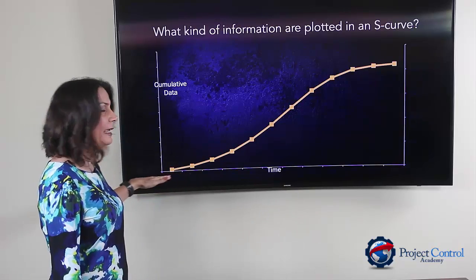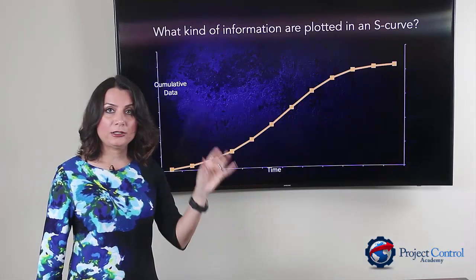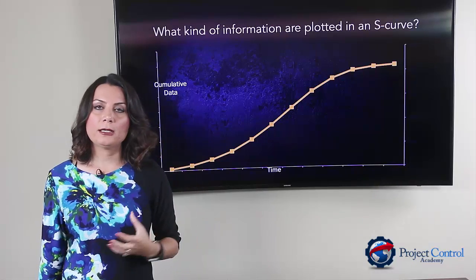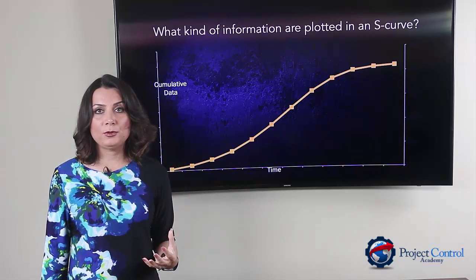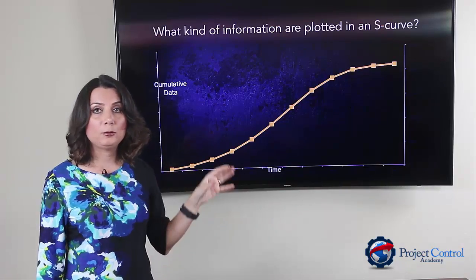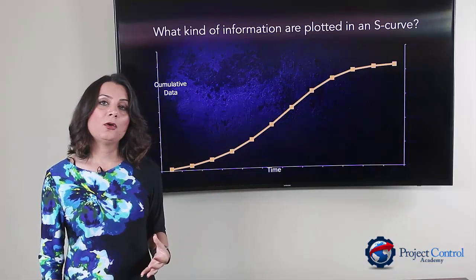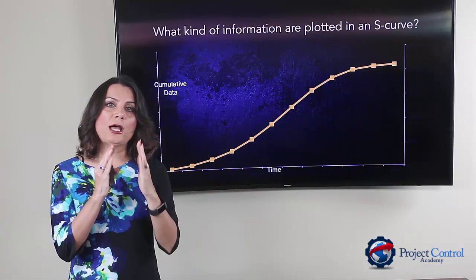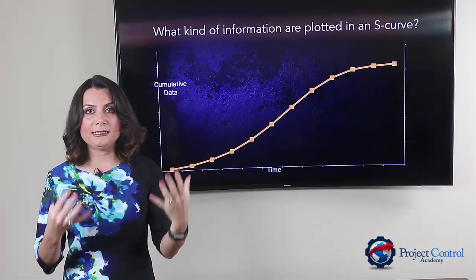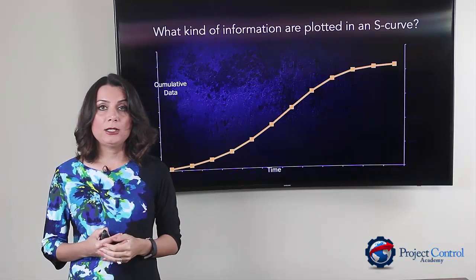The X-axis always shows your time, and the time intervals are based on your project reporting and updating cycle. If you are doing your project updating or reporting every month, it would be on a monthly basis — or it can be bi-weekly or weekly. The shorter the time intervals, the smoother your S-curve will be and the easier it is for analyzing the trends in your project.